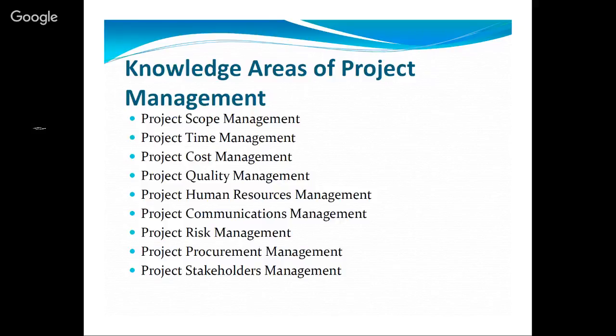Procurement. When we are looking at procurement management, that's why I earlier alluded to the fact that we should be looking at it from whether we are going to be using internal resources or external vendors. And even if we are using external vendors, we should be asking ourselves some questions. What kind of contract are we going to be going with them? Are we going to be going with time and material, which has its own advantages and disadvantages? Or are we going to be going with fixed price, which has its own advantages? Or are we going to be doing a combination of time and material and fixed price?